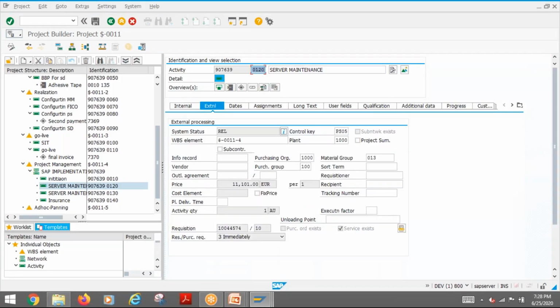So basically, you're telling that down payment, right, Abdul? Not only 25% down payment, 50% even the billing also. See, a normal small purchase is okay, but if you're talking about a huge purchase, nobody will pay the full amount, right? They will break up the payment into milestones. They will say, I will pay you this much this time, this much this time. For example, if you are ordering huge engines or huge machinery, they will not deliver to you without paying anything. So you have to pay some down payment.